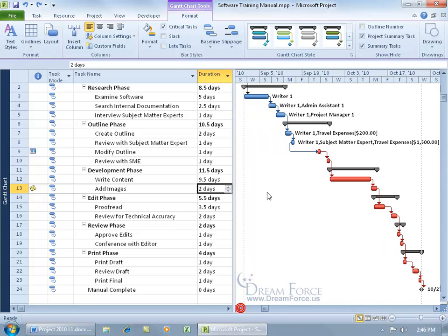Let me go ahead and scroll over just a bit. Because I can delay any one of these tasks, of course it'll bump out the next one because they're all linked and related. What's this task's finish date? When I hover over it, it's the 16th, and again, this one down below is the 24th. So I could push one of these tasks, or a couple of them, out a couple of days, that's fine, but if I push them out like 20 days, it'll push this out past the 24th, in which case everything's going to become critical. You can give it a try.